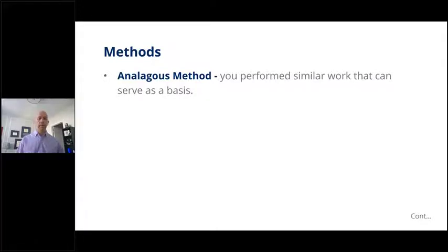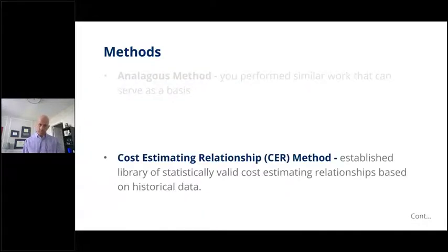If somebody came to you and said, well, we need you to make widget B, and widget B is made up of this material and it's this shape and it has this coating on it, you can say, well, we've never made that widget B before, but we made widget A. And it was made out of the same material. It was a similar shape and size, a little different. And it also used either maybe the same coating or, again, maybe a similar coating, right? So that's where you could take that information where you made product A in the past and apply that kind of information in estimating how you would make product B.